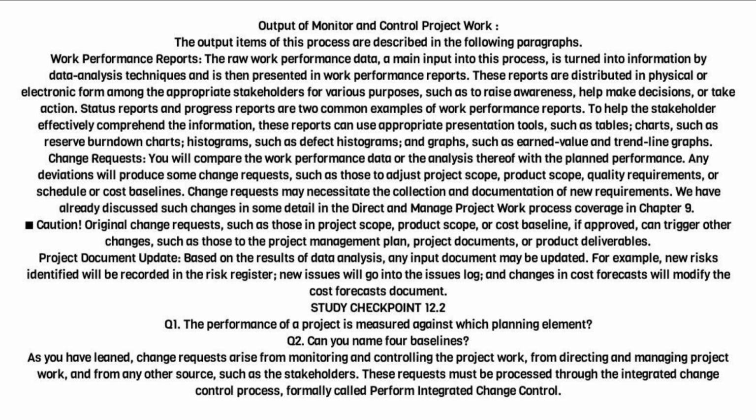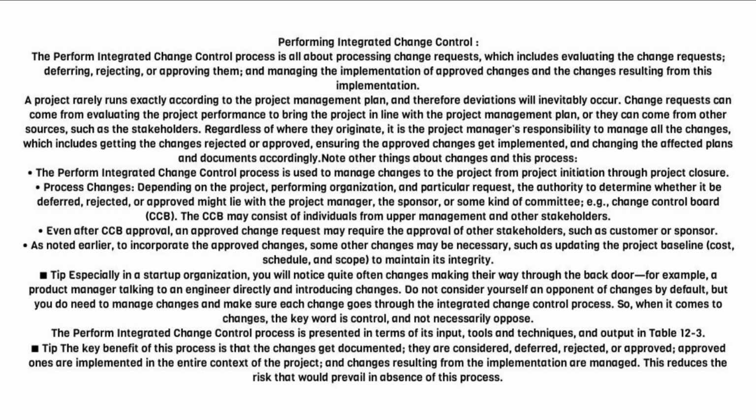As you have learned, change requests arise from monitoring and controlling the project work, from directing and managing project work, and from any other source, such as the stakeholders. These requests must be processed through the Integrated Change Control process, formerly called Perform Integrated Change Control.